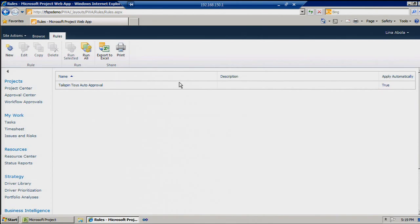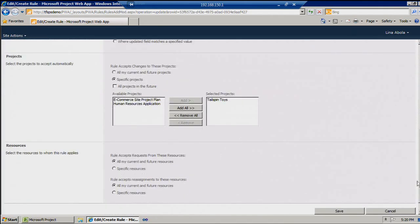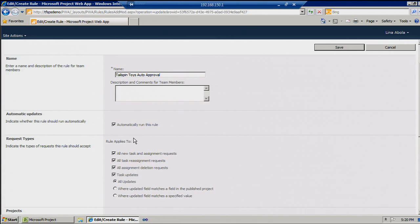Another simplification: this week we announced Service Pack 1 for Office/SharePoint, due at the end of June. As part of SP1 for Project Server, we're enabling auto-publish. Not only can you auto-approve, you can auto-publish — so you literally don't have to open the plan. You can come the next day and know you'll have the latest and greatest data in your plan. You can write different rules by project or by resource, and in SP1 you'll have a new tab for auto-approve and auto-publish.